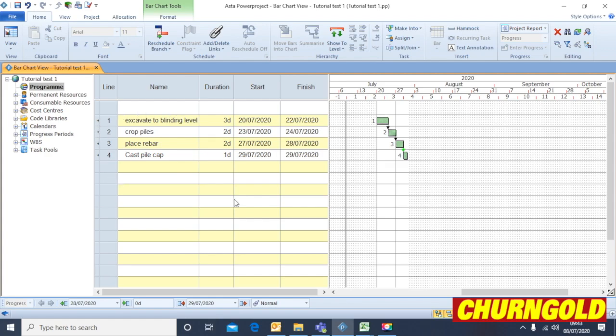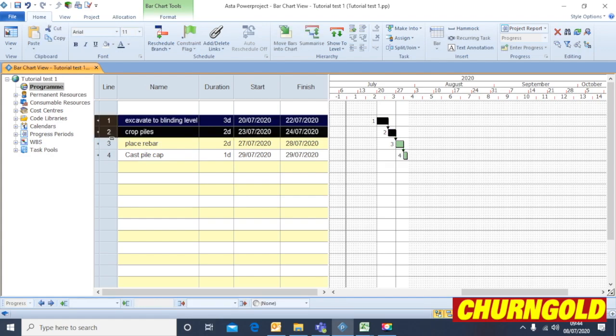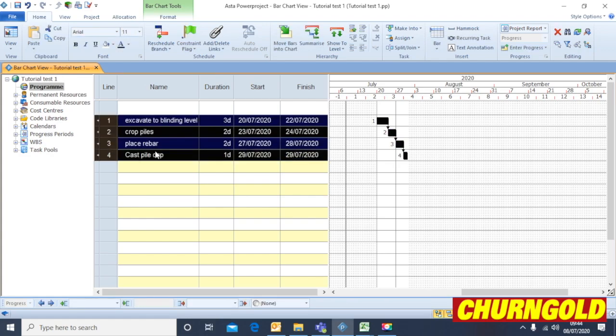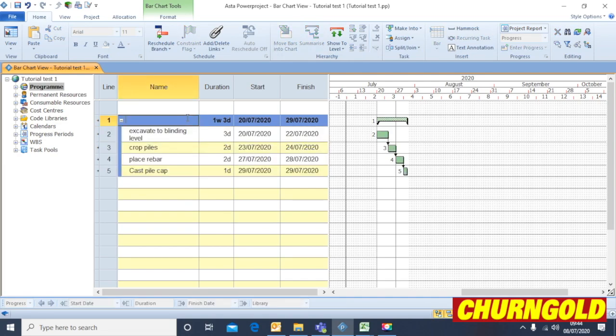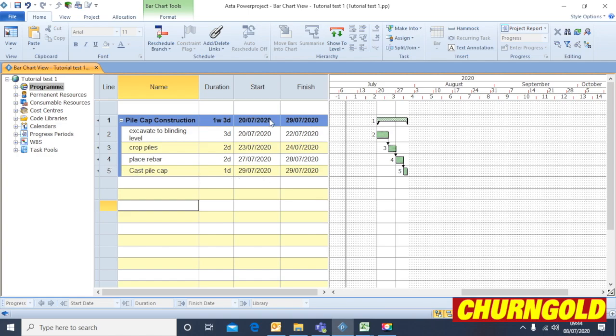Once you've created one simple task like that, which is obviously the excavating and casting of a single pile cap, you can select those items and use the Summarize button to put them within a heading. And that forms the basis of putting the data into the program.